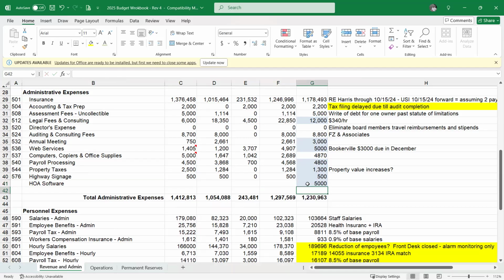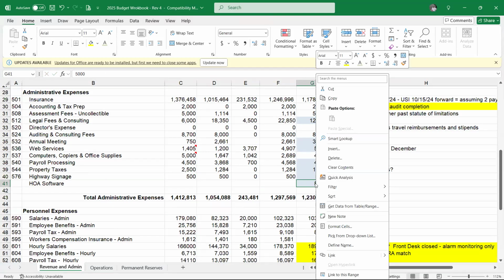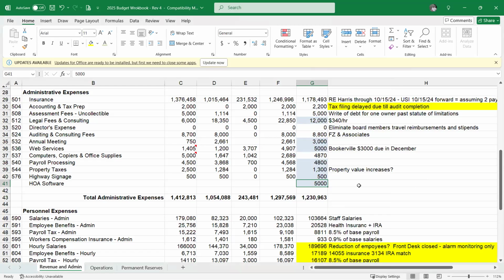So you think 7,000, Scott? Well, I mean, Joe just said 3,800. I have to believe there's some kind of setup costs or something like that. Yeah, with any software program, this is right in my bailiwick from when I was working, any software program you buy, you're going to have database entry, and that can cost as much or more than the software. Okay, so maybe for the first year we do 7,000, because that price that I was quoted was a year ago.